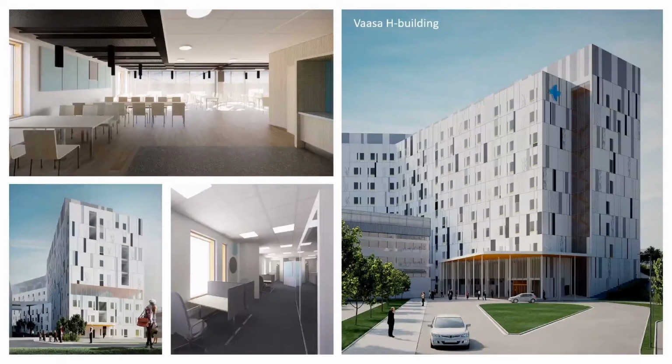But then in mid-March, when the COVID-19 situation began, all our employees started working from home. And at that point, all the projects where we have more than one person modeling were moved to BIM 360. This was obviously a very big change for us, but it was actually done in just 3 days.